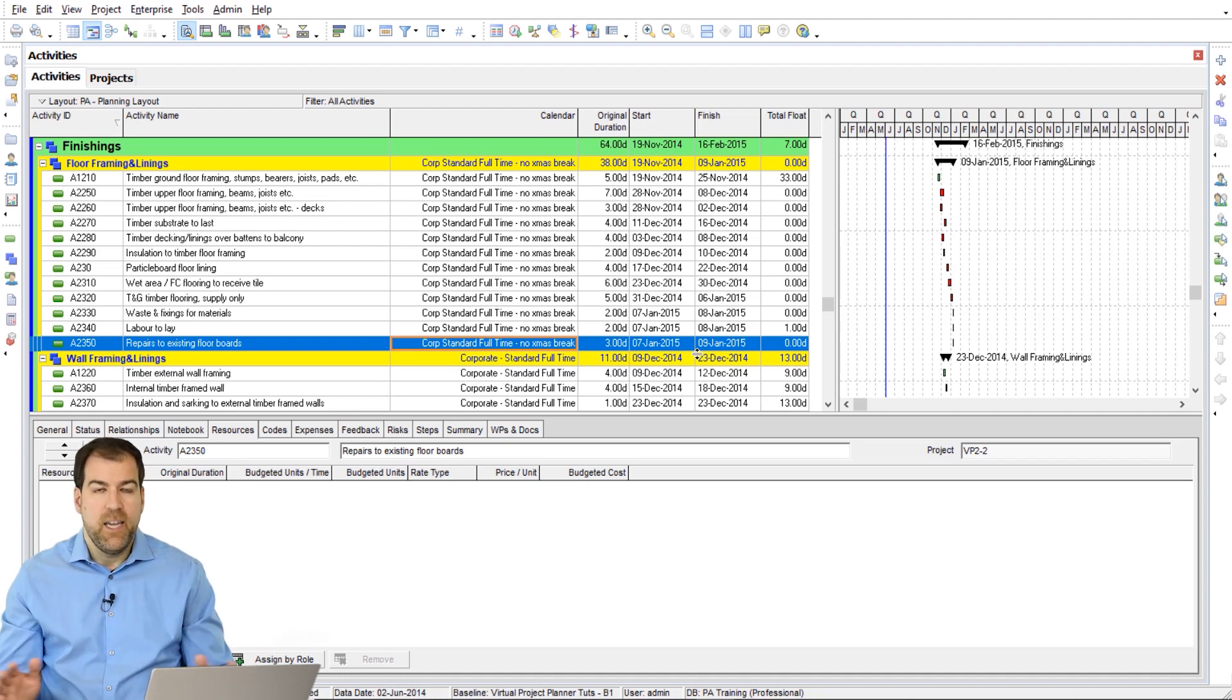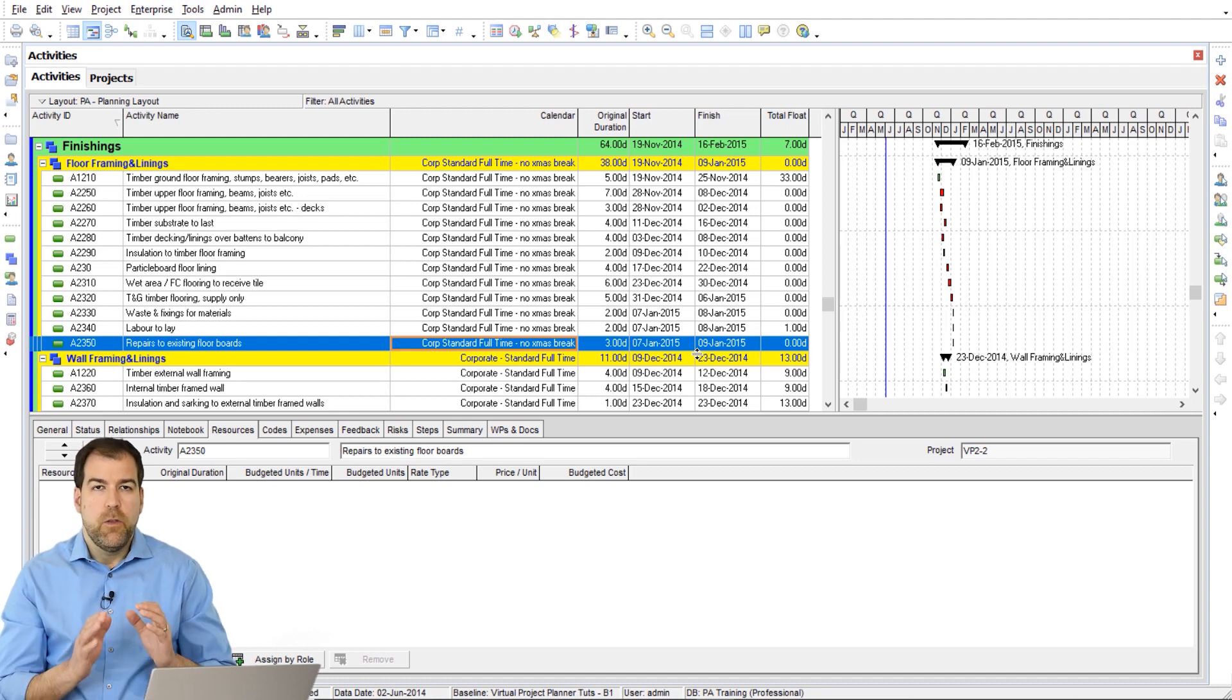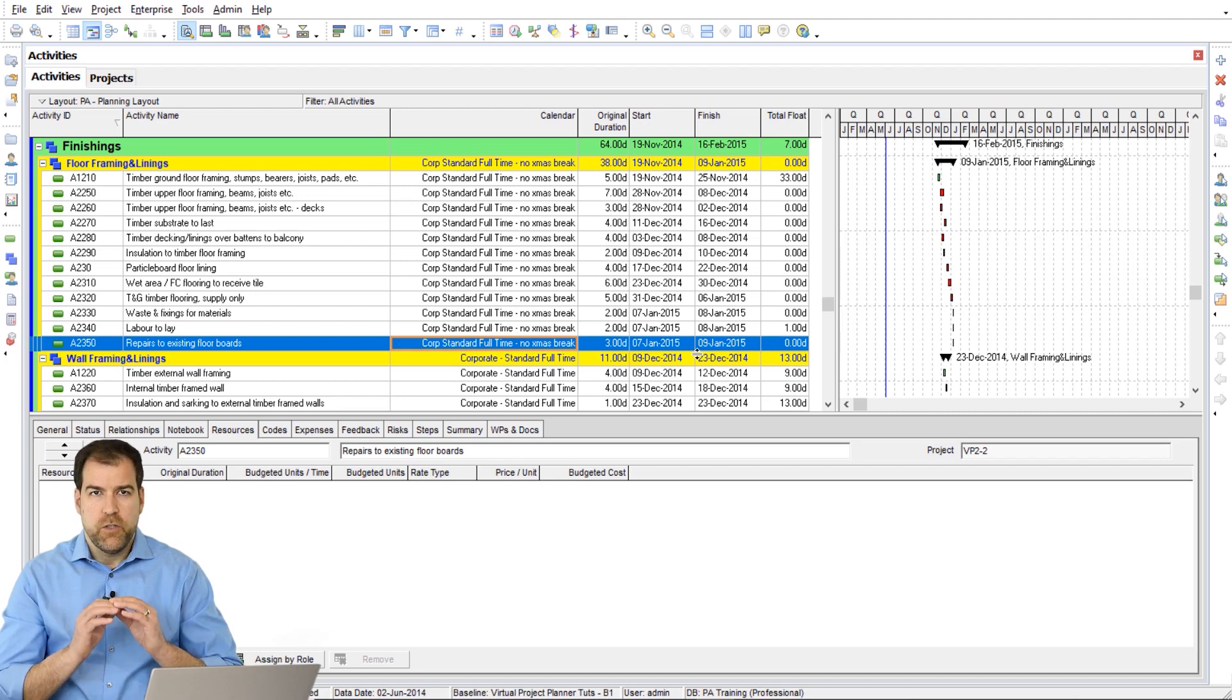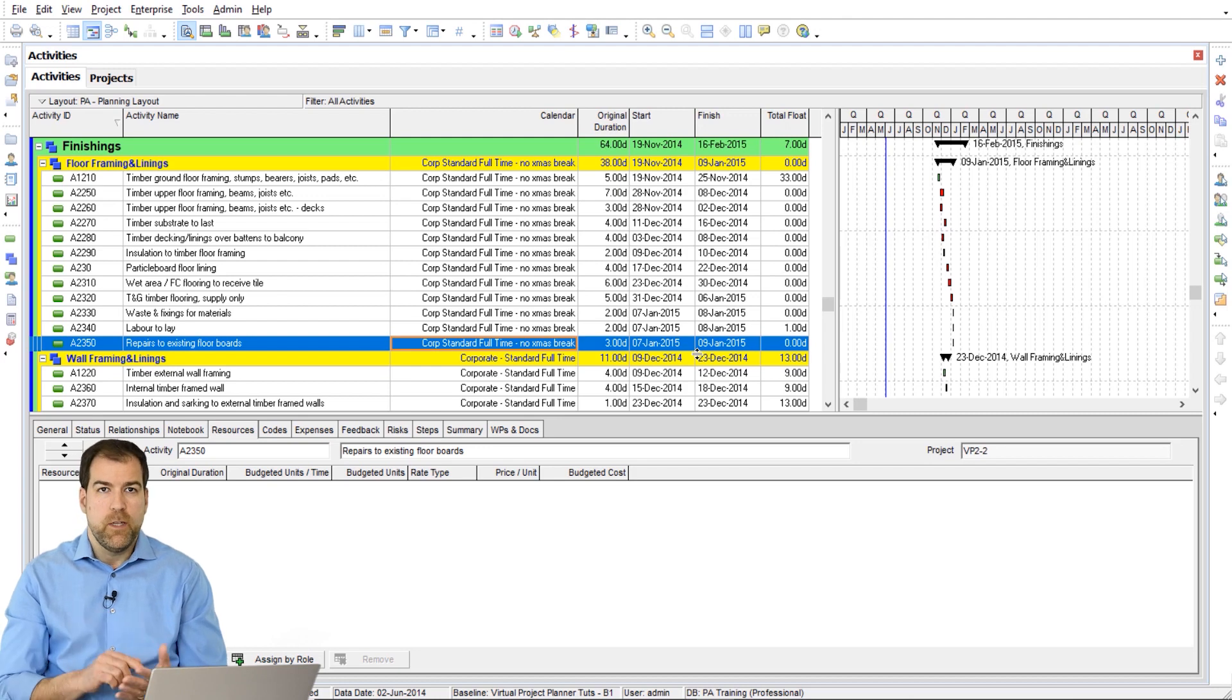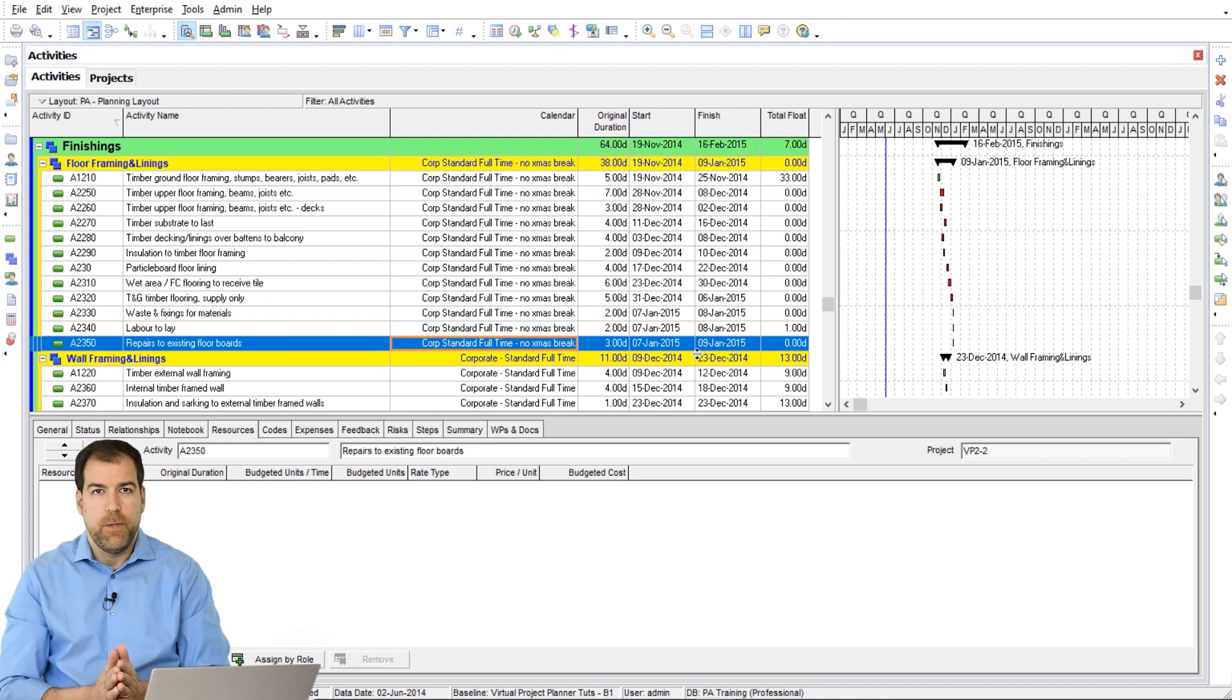Ignore it. It doesn't matter. Those summary bars are just trying to summarize things and make it look easy for you. Activities are what we assign calendars to, not WBS elements.